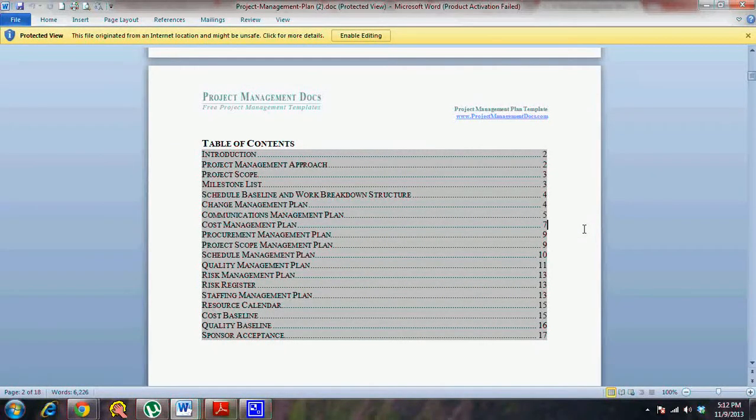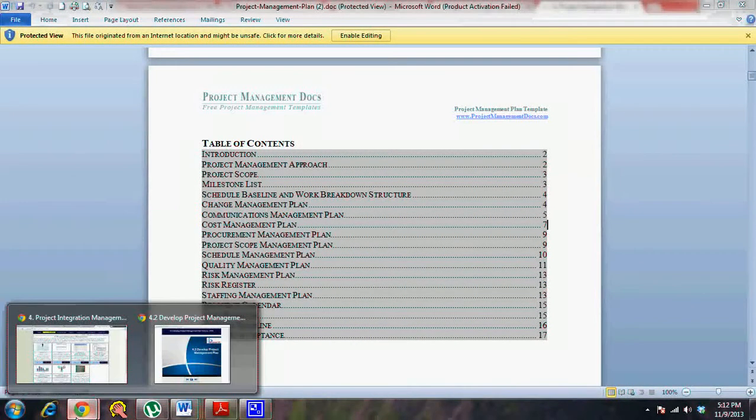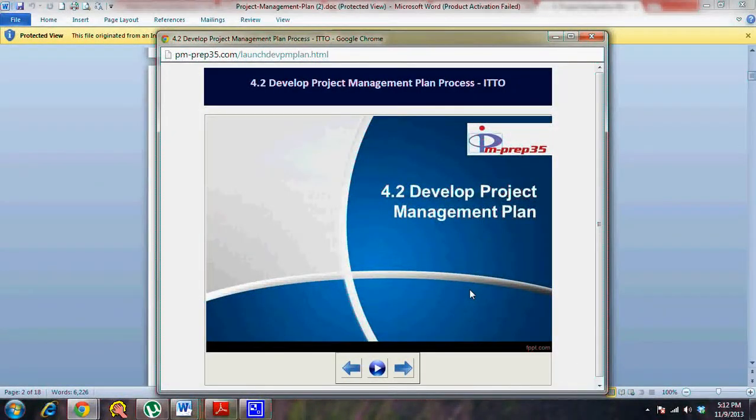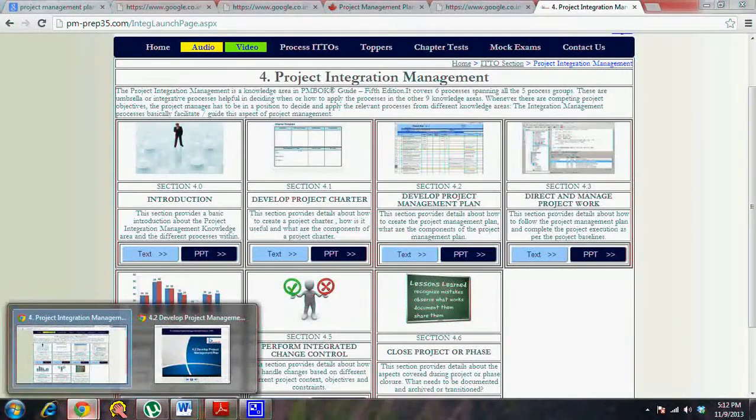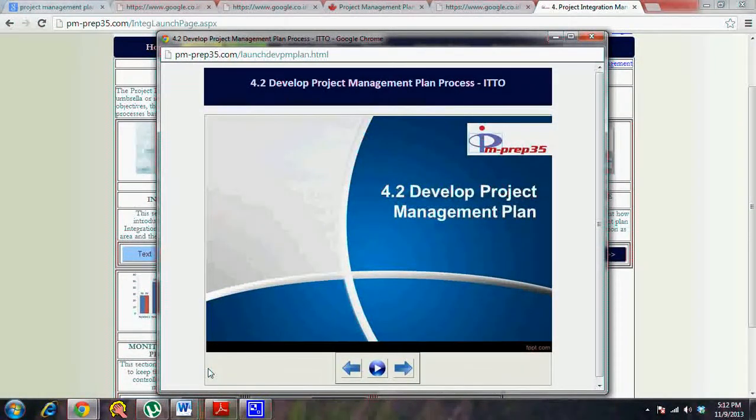And the project management plan, since it has the baselines, is used for the monitoring and controlling process to keep the project under control, to monitor if things are under control, and then make necessary changes in the process or ask for change control board intervention if something is going out of control or out of hands, or some baseline is going out of control.